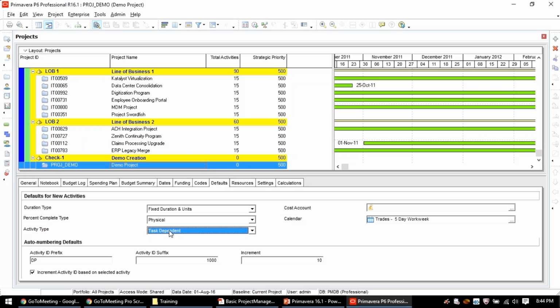The first activity could be that you need to remove the existing soil and the trees on your side roads, etc. When you are removing, you take that as a task. For that task, you definitely need some time, maybe 5 days, and you need JCBs, pro-liners and all. You need labor, and obviously we need money to pay the labor as well as for the JCBs, etc.